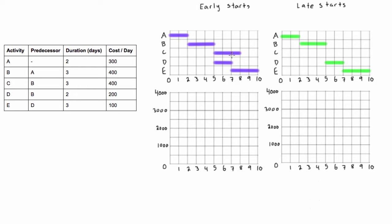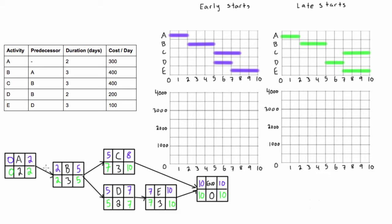Activity C is not on the critical path, so it can end at the end of the project without affecting the end date. Its late finish would be 10, and since it's 3 days long, its late start would be 7 to 10. If you're confused, you can always draw the PDM network diagram — I'll draw it here to confirm. Early start and early finish are in blue, late start and late finish in green, so for activity C: late start 7, late finish 10. It's a good skill to read the table of dependencies directly.